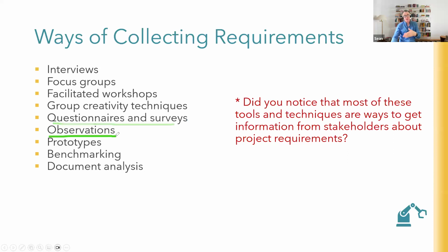They'll be making observations on what people actually do and maybe how they use existing products or other deliverables. They'll be making prototypes and presenting them. Either like in construction, they might make a 3D render of a building and get you to walk through it. Or in IT, they might mock up a wireframe of a website or a new app, and they'll show it, is this what you meant? Benchmarking, comparing what you want to existing solutions on the market, and then just reading lots of documents as well.